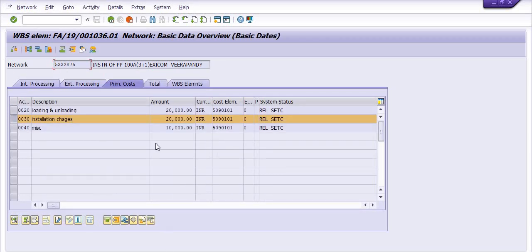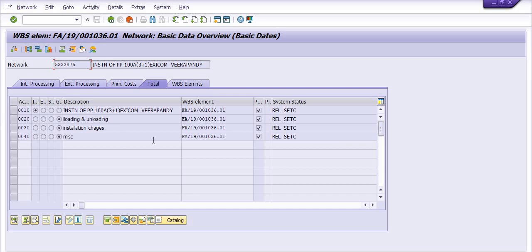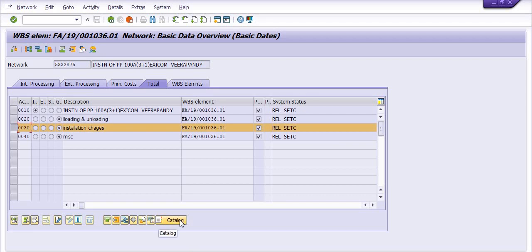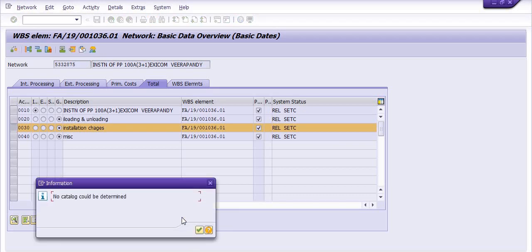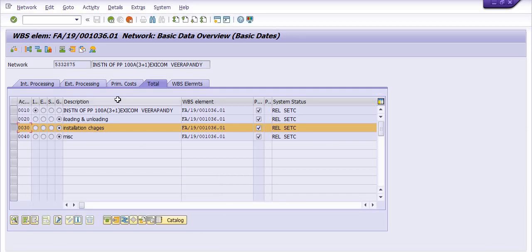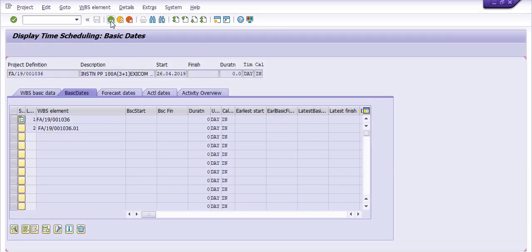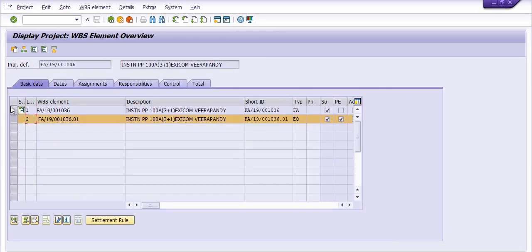In the Total field you can view all planned activities: line number 10 is material planning under the network activity, line number 20 is loading and unloading charges planned, installation charges planned, and miscellaneous charges planned. This is the way to check all these things in SAP with respect to WBS activity.